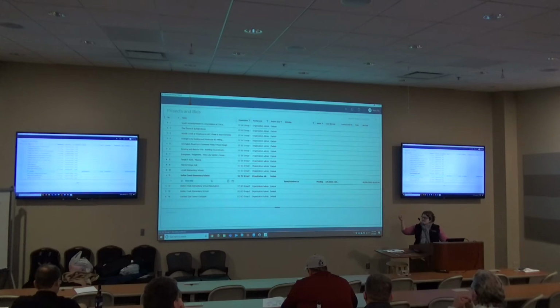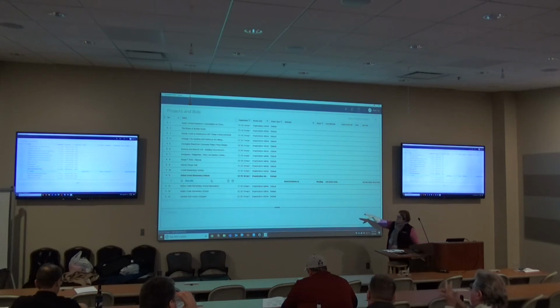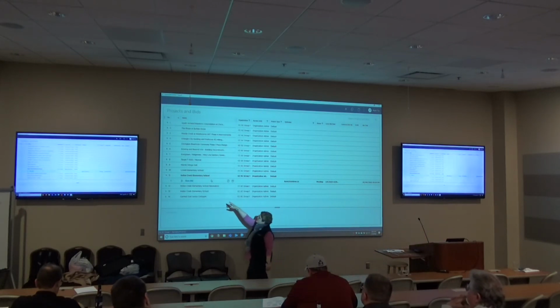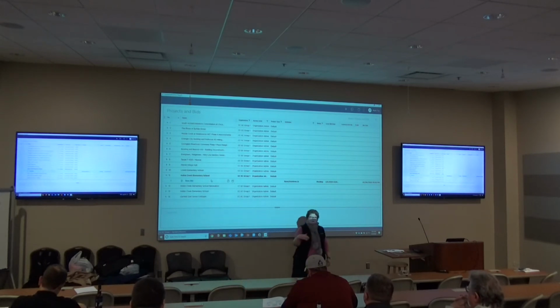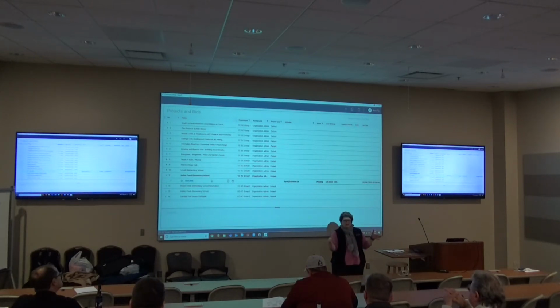I was looking to see if you had a sample job that has the multiple bids underneath. Not in this order, sorry. Okay, so where it says base bid right here in blue, under Indian Creek Elementary School, I can create a new bid under Indian Creek Elementary School and call it revision 1, revision 2, and so on, or schematic design, 50%, 75%, issue for construction, and so on. The cool thing is that it is all encapsulated under that project, and all of those bids have access to the same pool of drawings. You can complete a bid at whatever stage you were involved in, and you have that milestone tracked in its own bid name.